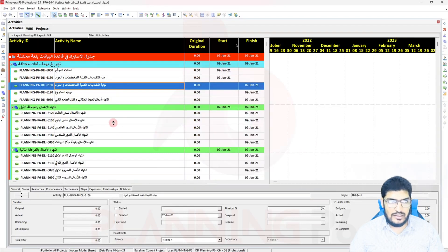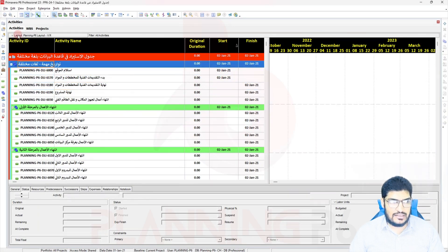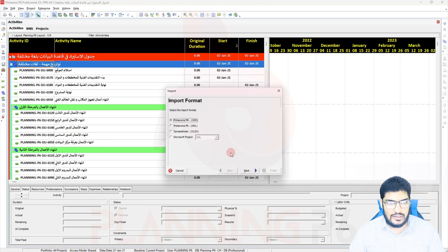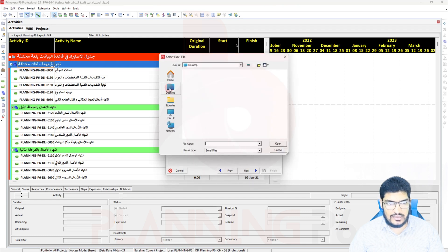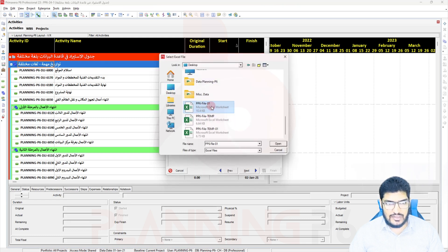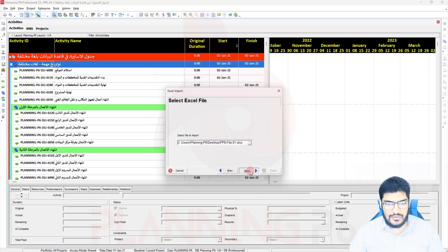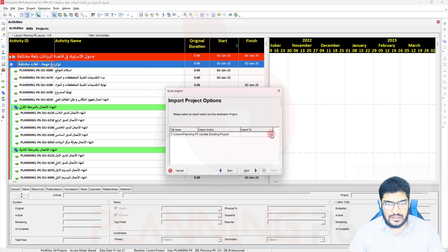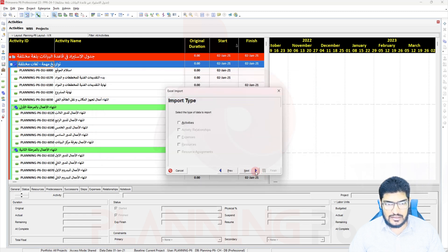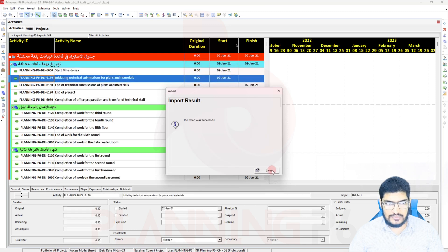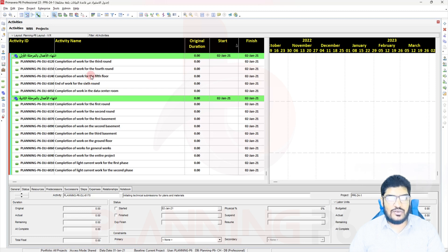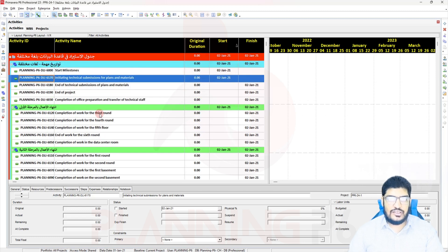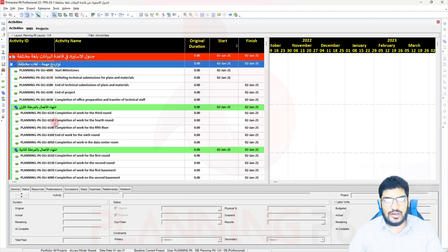Now I import the translated Excel file back into Primavera: File > Import > XLS. Browse to the desktop, select 'PP6_file_01', click Next, choose to update the existing project, map to Activities, click Next and Finish. Now you can see the activities have been successfully converted to English. This is the method for converting the activity names.